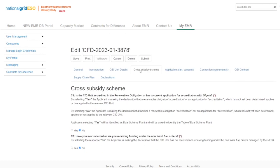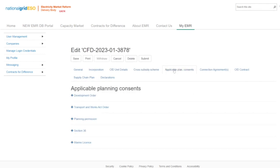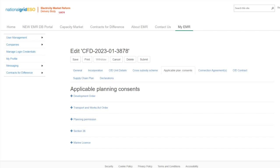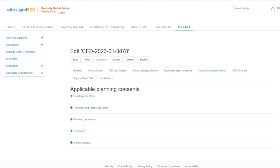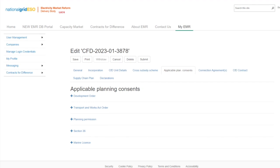Moving on to the applicable planning consents tab. At this stage, the applicant is required to provide all the planning consents applicable to the proposed CFD project. The applicant must demonstrate that either the applicable planning consents do not apply, or that the consents obtained enable the proposed CFD unit to be established or altered, and electricity generated to be exported to the national transmission system, the distribution system, or a private network.